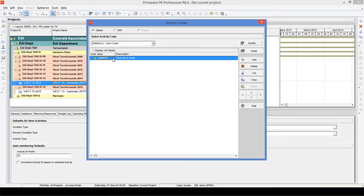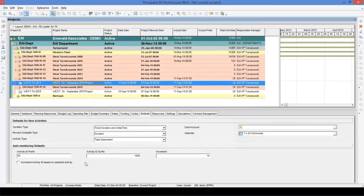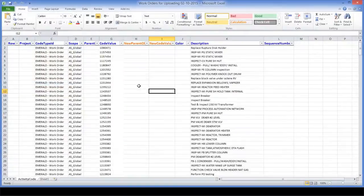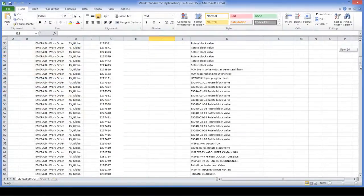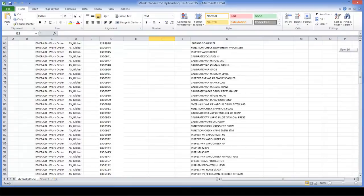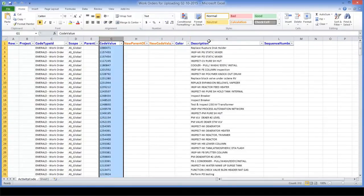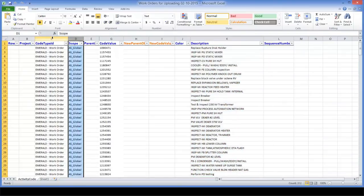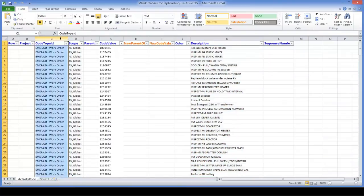I can do it much faster and more efficiently using P6 Loader. Instead of adding those work orders manually, I am going to use P6 Loader to upload the new activity code values into the data. I created an upload file using the P6 Loader template. This file has a list of all work orders, code values, and descriptions. I also need to specify the scope and activity code type — this is the data that P6 needs to accept the file.